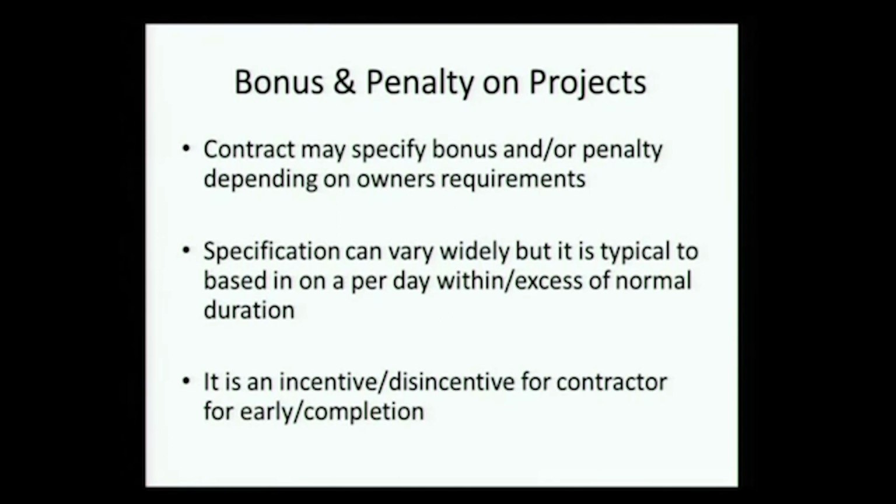The reason for this is that the owner, if he gets a facility early, can generate revenue out of the facility, so he passes a little bit of that to the contractor. On the other side, if he cannot use the facility, he loses money and penalizes the contractor. This is certainly an incentive for the contractor to try to finish earlier.